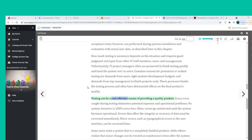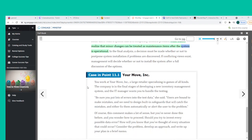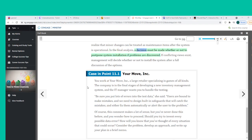Testing can be a cost-effective means of providing a quality product — every error caught during testing eliminates potential expenses and operational problems. No system, however, is 100% error-free, and errors often go undetected until the system becomes operational. Errors that affect data integrity must be corrected immediately, while minor errors can be corrected later. In the final analysis, a decision must be made whether to postpone system installation if problems are discovered, with management deciding after a full discussion of the options.